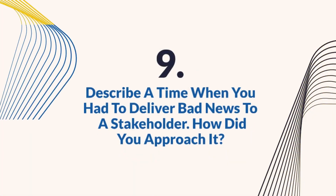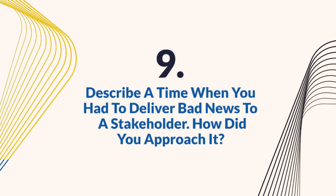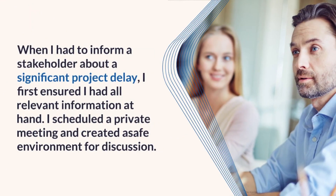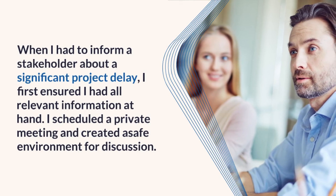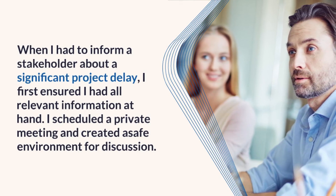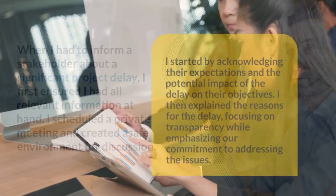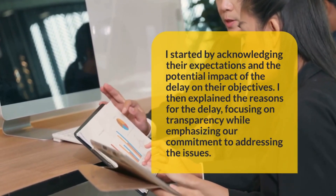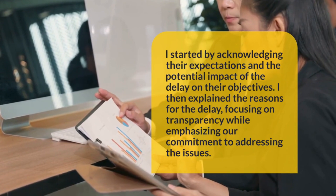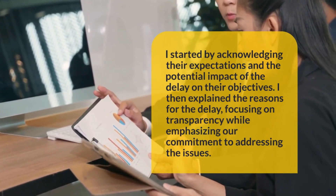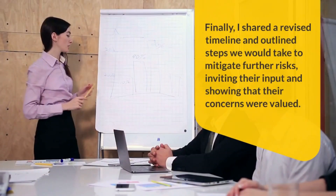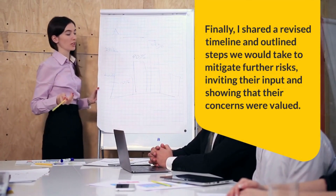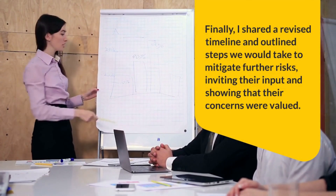Question 9: Describe a time when you had to deliver bad news to a stakeholder. How did you approach it? When I had to inform a stakeholder about a significant project delay, I first ensured I had all relevant information at hand. I scheduled a private meeting and created a safe environment for discussion. I started by acknowledging their expectations and the potential impact of the delay on their objectives. I then explained the reasons for the delay, focusing on transparency while emphasizing our commitment to addressing the issues. Finally, I shared a revised timeline and outlined steps we would take to mitigate further risks, inviting their input and showing that their concerns were valued.